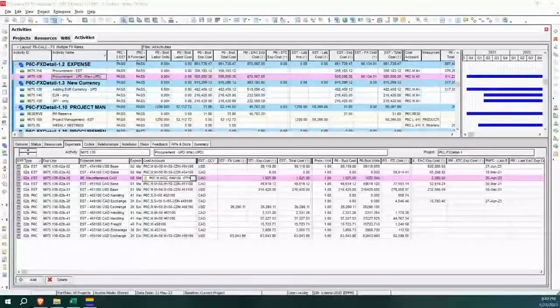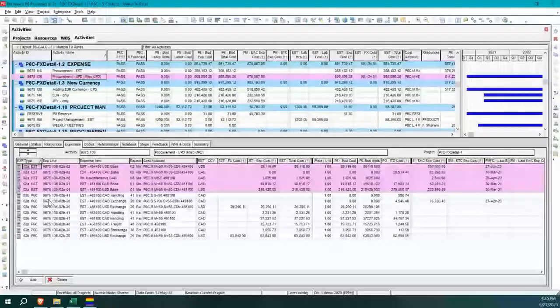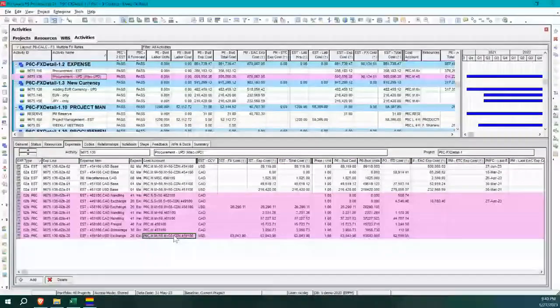So it looks like the estimate had certain items that we were going to go procure. And those items needed different handling, exchange, freight, brokerage, all taking place automatically. So essentially, these line items we got from our estimate, and these line items P6-Calculator automatically figured out and filled in, and our scheduling team did not have to do all these calculations in Excel or other systems. So that can be a huge time saver.